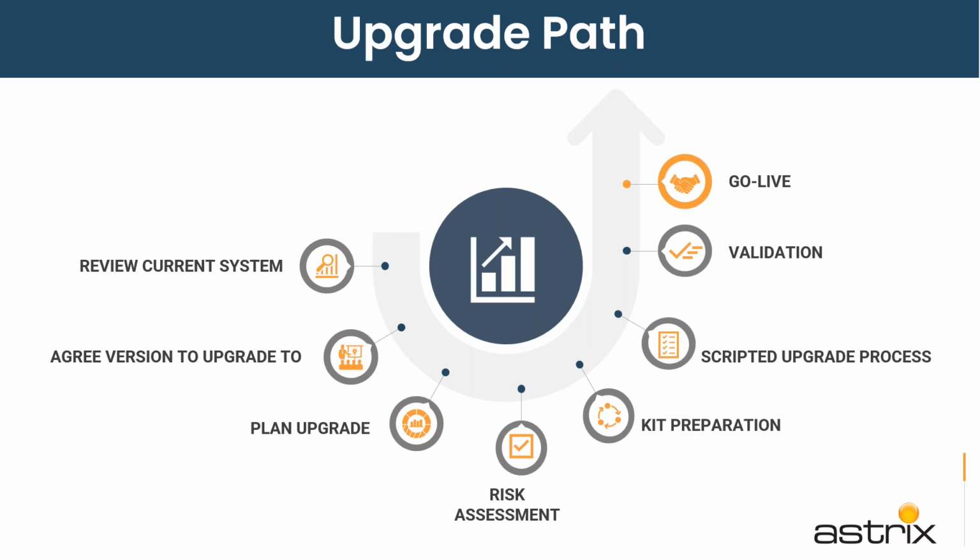Then it's pretty much a scripted upgrade process, because we might have already done the dry run and everything in your test instance or your dev instance, whichever instance we have, which is not the actual prod. So we ensure that everything is working fine, and then we do a scripted upgrade process to ensure that there are no manual errors.